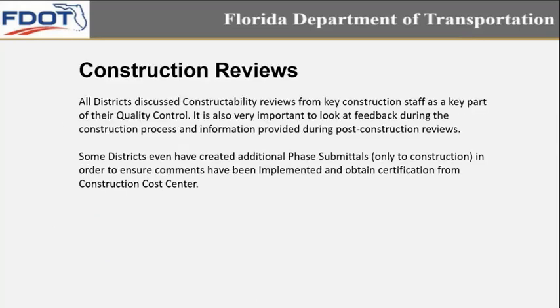And probably one of the biggest ones people have a lot of faith in is constructability reviews. All districts discussed constructability reviews from key construction staff as part of their quality control. It is also very important to look at feedback during the construction process and information provided during post-construction reviews, making sure those lessons learned from construction are incorporated back. Some districts have even created additional phase submittals only to construction in order to ensure comments have been implemented, and they use that as a mechanism to obtain certification from the Construction Cost Center.